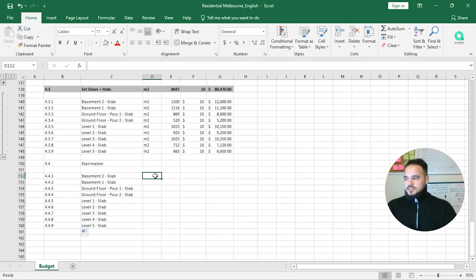Now the stairs we will price per... Actually, the stairs are going to be different. So again, to get the price of the stairs, you will get the drawings, architectural and structural drawings. You send it to any supplier that provides the material that you want, and then you get the price from at least 3. So you can compare the price, and then you price your job.